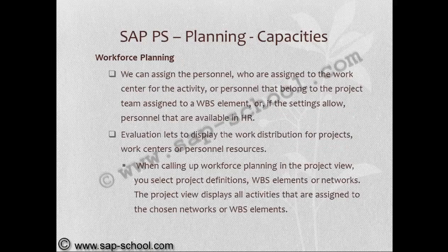We can assign the personnel who are assigned to the work center for the activity, personnel that belong to the project team assigned to a WBS element, or, if the settings allow, the personnel that are available in HR. Evaluation lets us display the work distribution for projects, work centers or personnel resources.